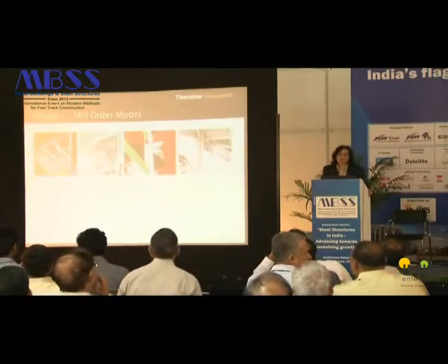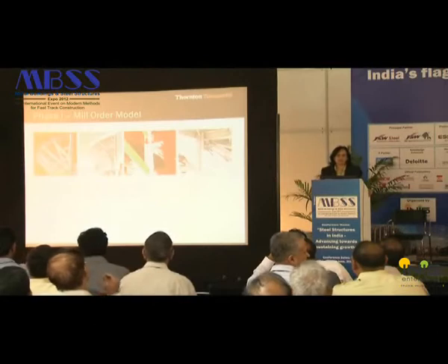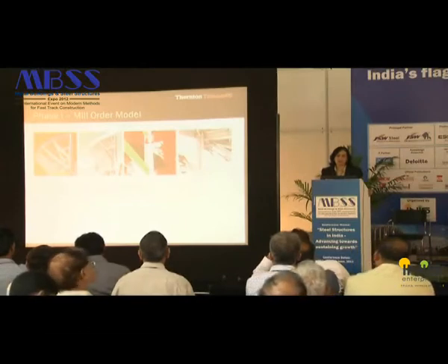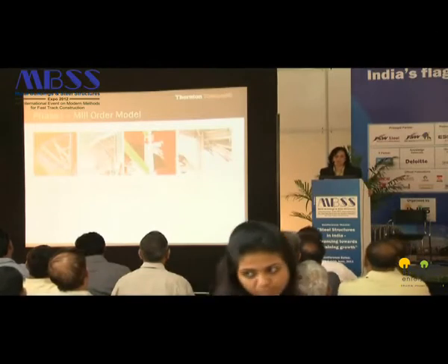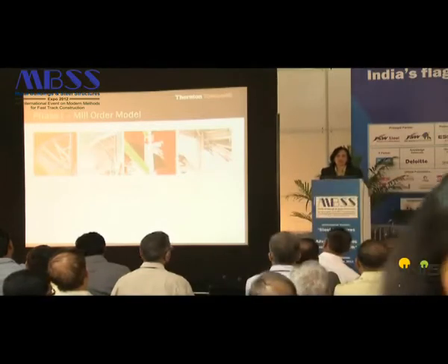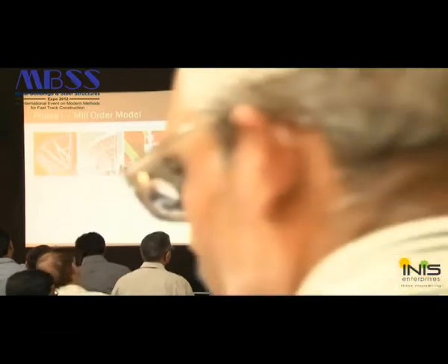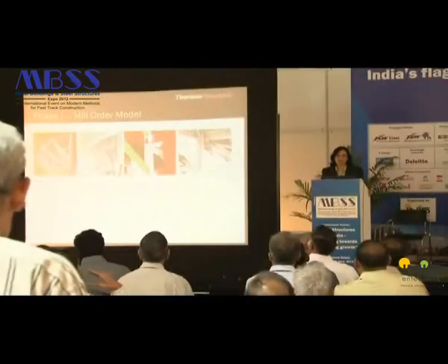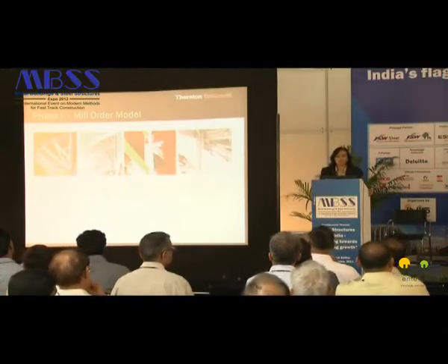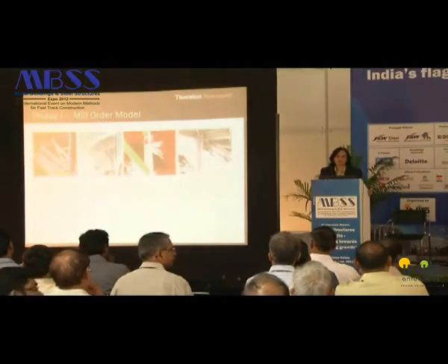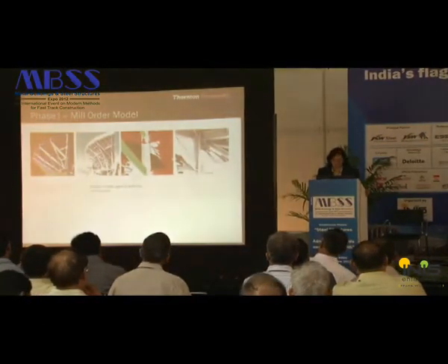So when you start ordering the steel in a steel project, there are 3 phases we break the steel design process into. The first one is the mill order, which is for rolling of the sections. That is needed way early because it takes time to roll the sections, and depending on the size of the project and the size of the members, sometimes you can buy them ready off the shelf, or sometimes you need to get your order in line so it can be rolled.